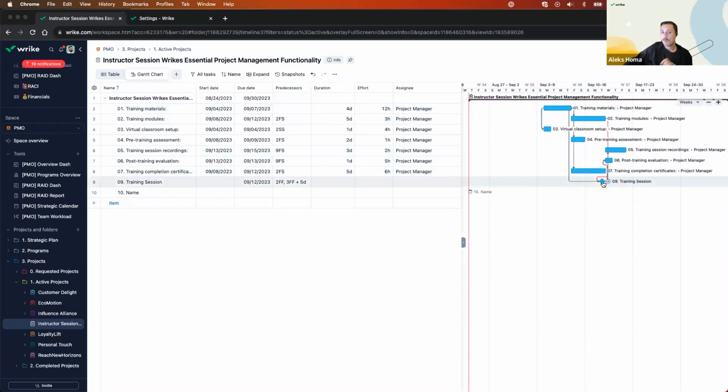Now, we will not automatically move milestones. Part of the reason why we don't move milestones is because we're saying that task will in fact start on the 12th of September. We cannot assume that it's going to automatically move or shift or change after the fact. You're telling me that it's going to start on the 5th of December. And by the way, part of the reason why there was a conflict earlier and it was moving back was because of this 5-day predecessor, 5 days extra that we're trying to give it here. So there's a conflict immediately there telling me that that won't work.